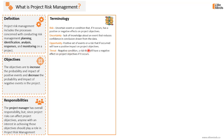A threat is a negative condition — a risk that will have a negative effect on project objectives if it occurs. So any identified risk in your project can be an opportunity or a threat. The probability of a risk is the likelihood that a risk will occur, usually represented as a percentage, like 70% or 60%. The impact is the effect on the project if the risk occurs — what will be the effect on at least one project objective? Think of probability and impact like the first and last name of any identified risk.